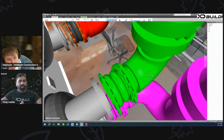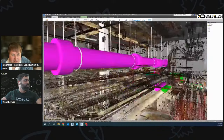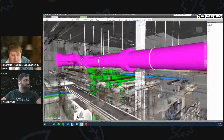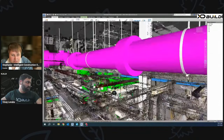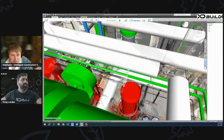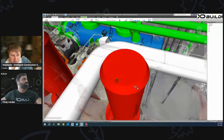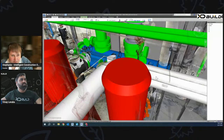Okay, so again, helpful, and you're talking about the lack of working at heights. We also have 32-inch bore pipes in this space. The headers are 32-inch. So we also have the advantage of not welding in very restricted spaces with very restricted access. This entire header with all the flanges is prefab, so there is no welding done on site on this header.